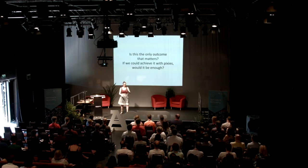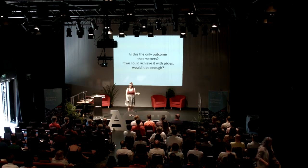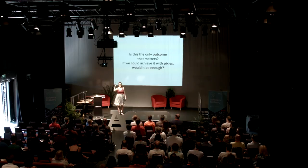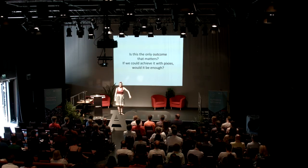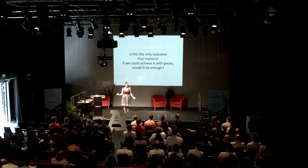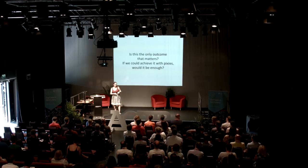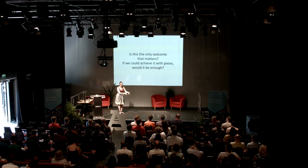Imagine I've got a white goods shop. I'm still doing everything on a calculator, carbon paper for receipts. Every Saturday there's a line out the door and some customers end up going to my competitor. Would it be useful for me to have some till software that dealt with scanning and ringing up prices quickly, but didn't manage stock control? Yeah — you could deliver me that. It'd be useful. This is how we get an MVP: what's the smallest useful thing we could deliver that would be valuable or that we could learn from? And then we could do stock control later.